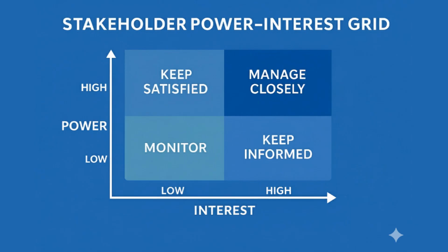There is one more section of society which does not like to have any development in that particular area. Hence, they are going to do some protest and they are going to be against this project coming up. So here you have a stakeholder who is going to negatively impact the project. Stakeholders get identified as part of initiation. Once all the stakeholders are identified, the list is going to be maintained in the stakeholder register.